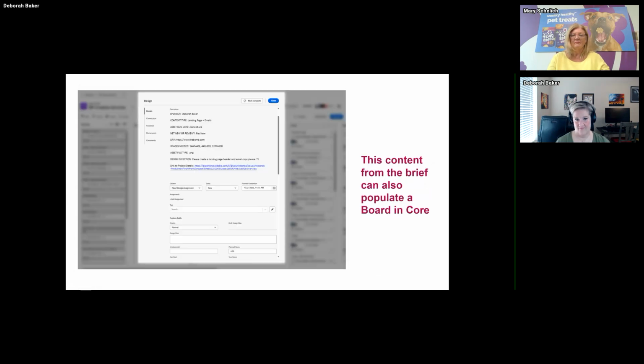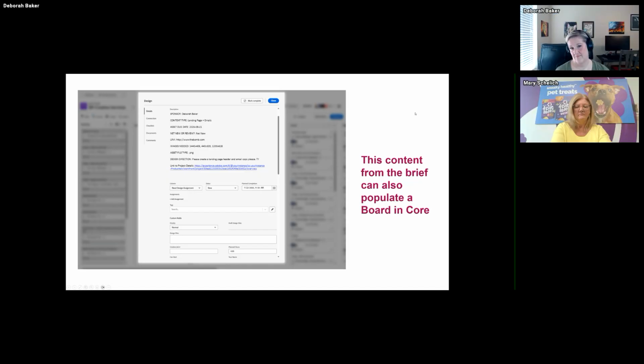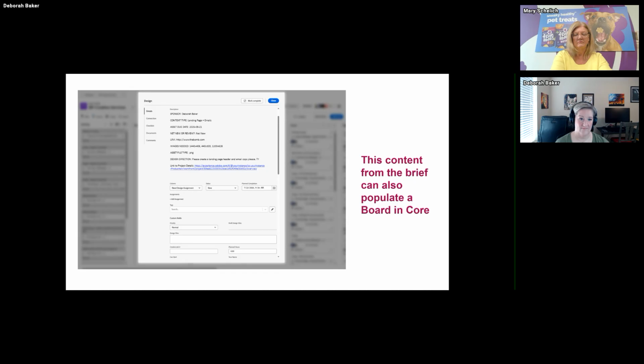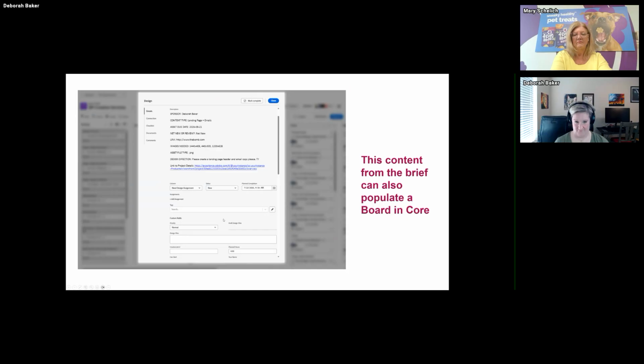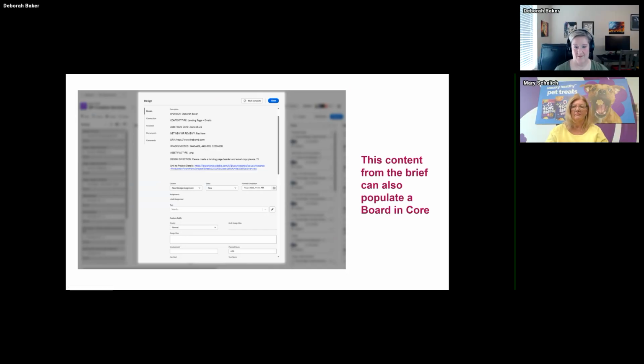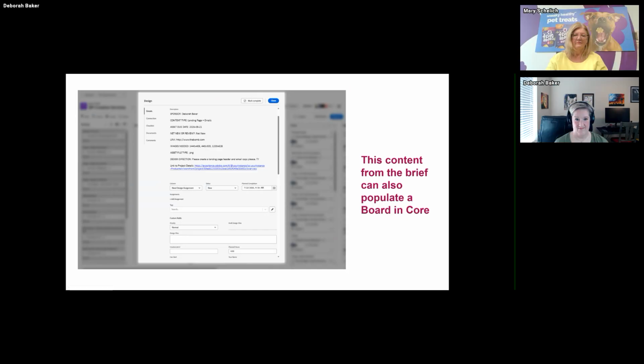So rather than have them open their card, open the project, go to the project details, and sift through the information they need to complete their task, we utilized Fusion to copy the necessary fields from core and copy them down to the task description level to appear on the cards.